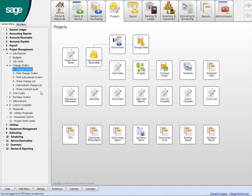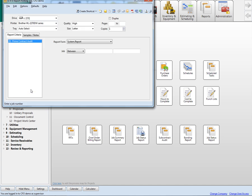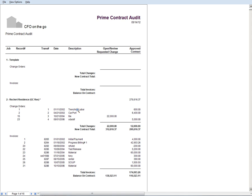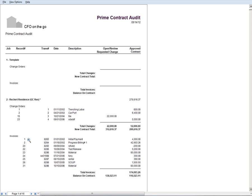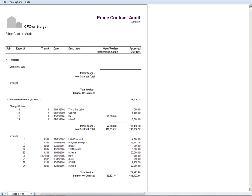Again, I'm going to hit everything. We do AIA 702, 703 billings. That's not an issue. This is a nice little report. Right here is job number two, kind of in the center here. Here's my original contract value, 278. These are the change orders. This one's still open. So there's the change orders that have been approved. New contract value. Here's what I've invoiced them to date. And here's what's the balance on the contract is. So bottom line is I can get back to any of this detail I want by just double clicking any of these items. So we do a pretty good job, I think, on doing that.